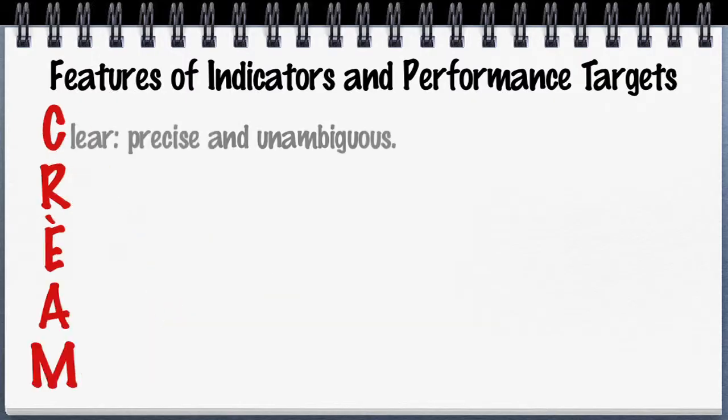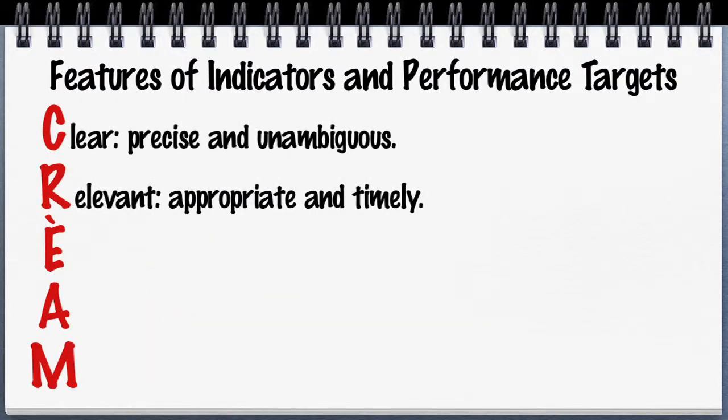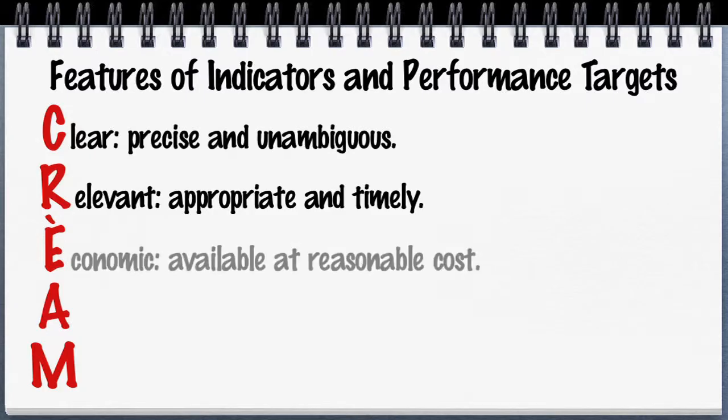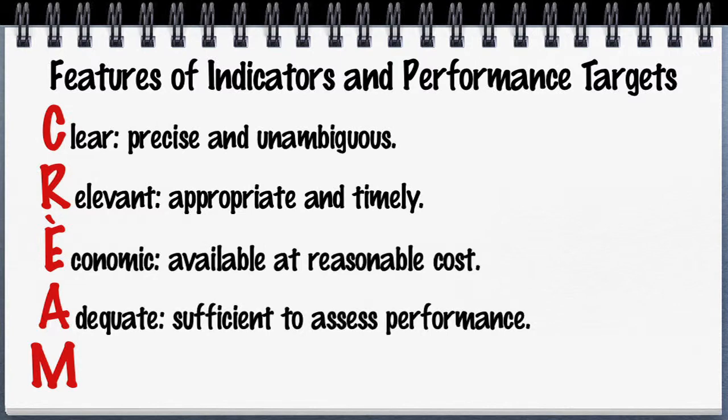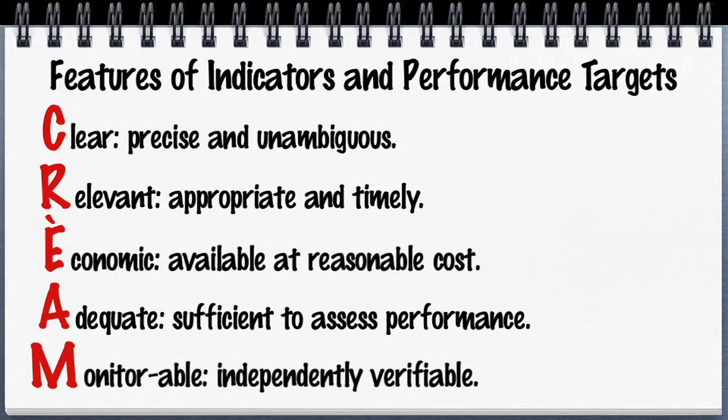CREAM. Clear, precise, and unambiguous. Relevant, appropriate, and timely. Economic, available at reasonable cost. Adequate, sufficient to assess performance. And monitorable, can be independently verified.